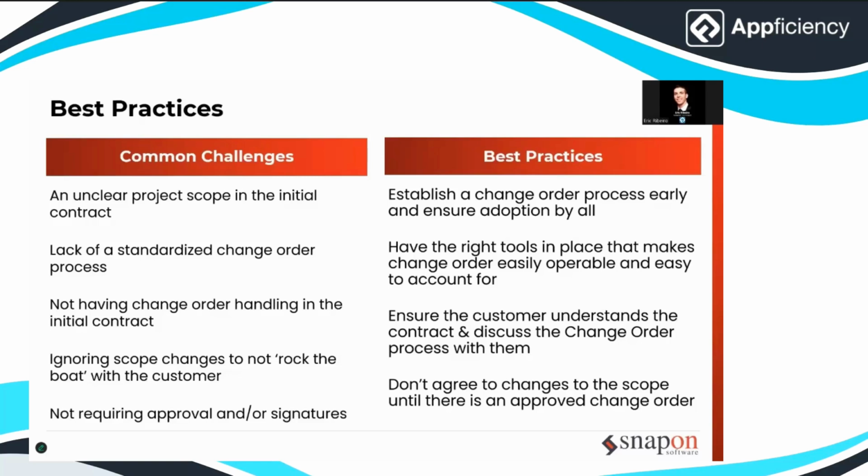So standardizing how change orders are introduced, how they're priced, how they're documented, how they're approved across the company really helps keep things organized and reduces costly oversights. Timing is also very important. The sooner a potential change is identified and raised, the better. Early visibility gives everyone time to assess the impact on budget and timeline and to agree on how to proceed before work actually starts.